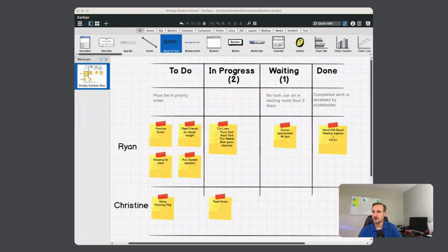Because as we know, if you've listened to the episode on multitasking versus working serially or prioritized based working, there is a penalty for multitasking, an efficiency penalty, where it actually takes you longer to complete work when you multitask versus working serially: work on a task, complete the task, and then move on to the next task.